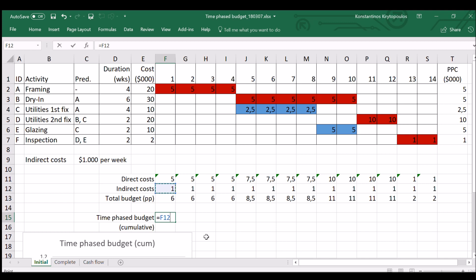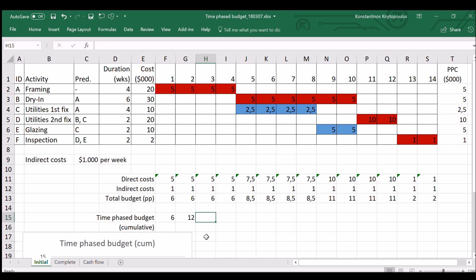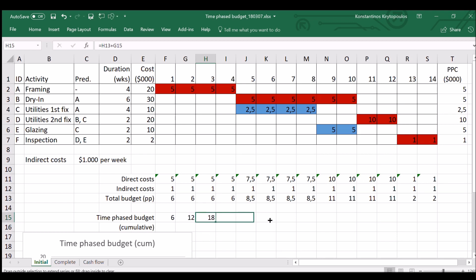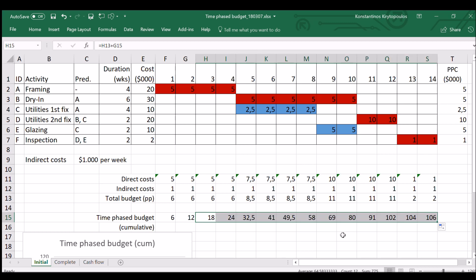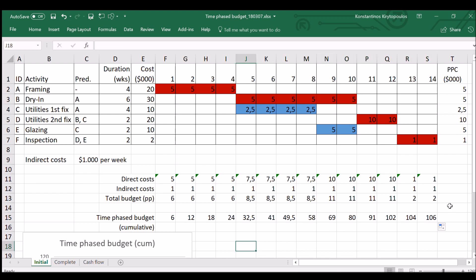But it's usually presented in a cumulative way. So under week one, you have the total budget of week one. And then week two, you will have budget for week two plus all the previous expenses. This is $12,000. The same for week three. The cost of week three plus the previous expenses. And this will obviously only be increasing up to the level of $106,000. So the overall costs covering direct and indirect costs is $106,000. There you are. That's the final cost.